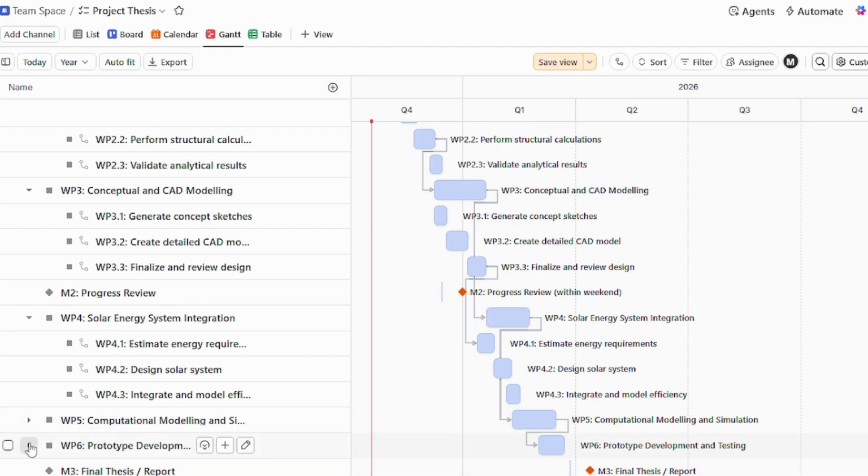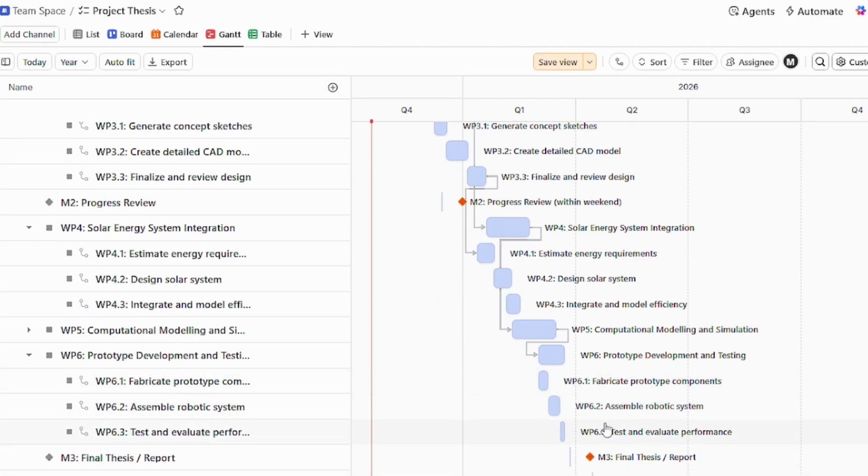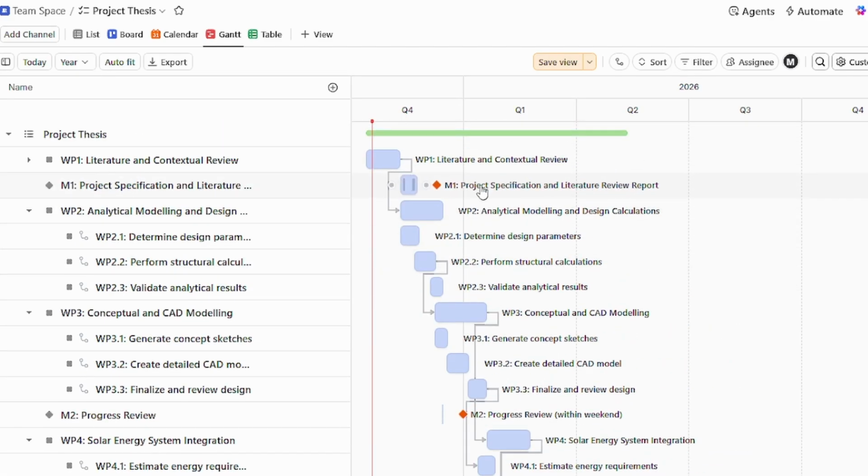So if we look at the last one, you really don't want to start testing and evaluating, so you can't write the final report comprehensively until you finish that. So maybe this has a dependency on that. But the portfolio document can start anywhere. You can even start compiling your portfolio right from the beginning.